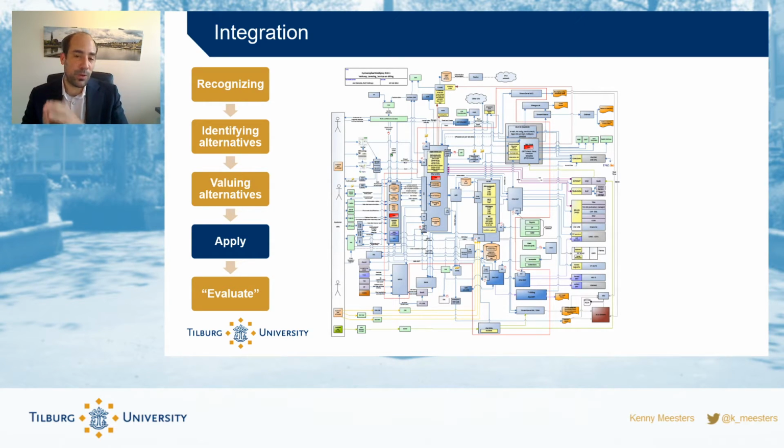Anyway, so when we talk about implementing systems, remember that we're not only talking about users. It could be that the users are fairly easily transferred, but databases and connections from an old system nowadays can be extremely difficult to move around. So keep that in mind when you're implementing systems. Make sure you check what the old system was connected to before you put something new in, and which ties you're severing and which ones you're connecting new.